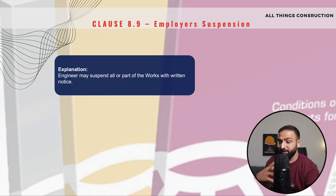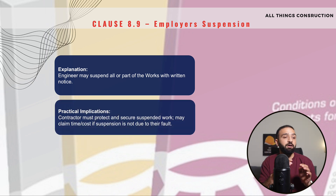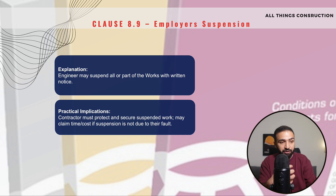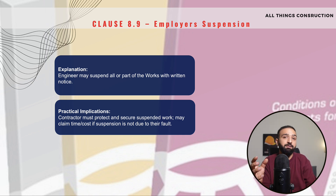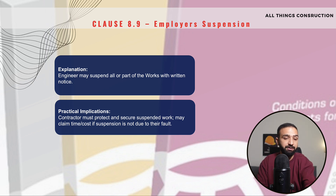We contractors must receive this suspension notice in writing from the engineer. An important implication of suspension is that during the suspension period, we contractors must ensure that we protect and secure all of the works. The costs, time, and claims associated with suspension will be covered in the upcoming clauses.